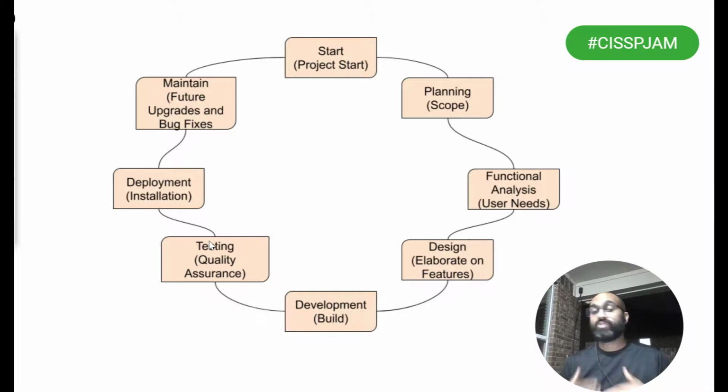If you find some issues, you need to fix them. And then of course the next phase of the software development lifecycle is the deployment, where you're going to the customer site, or it may be on the cloud, wherever you are deploying it into production. The end users are actually starting to use this software, and you may deploy it in phases. This company has 1,000 users. We're going to release it 100 users at a time and see how it goes.